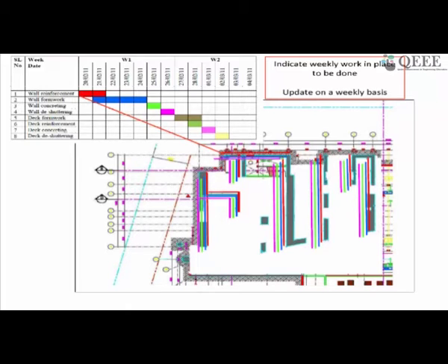Getting into details, you have to calculate resource buffers, you have to calculate other buffers, and then keep track of the buffers to be able to manage a project, which is too detailed to get into here. But please understand that resource becomes very central as far as CCPM goes, and bottlenecks for resources have to be resolved. So this becomes a very key thing. The second issue is to look at commitments, how people react to different timelines, how people react to the early start or the early finish, or all of that.